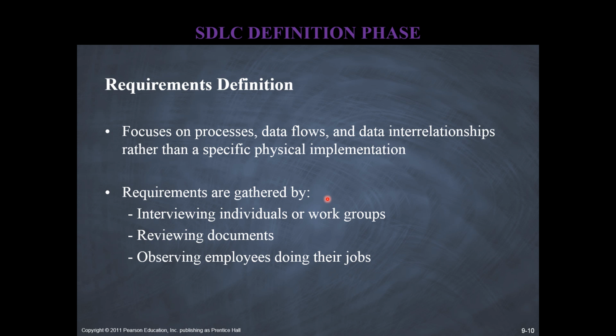So how do you gather requirements? Well, there are a lot of methodologies that are used for gathering requirements, but at the most basic level it can be interviews, just interviewing individuals or interviewing individuals in groups and simply asking them, what are the things that you require, what are the things that you need from an information system. Maybe prior to arranging those interviews, because they take a lot of time and are costly, since you're basically using up the time of a lot of individuals within an organization, you may do some kind of secondary research where you review existing documents to come up with a preliminary list of requirements.